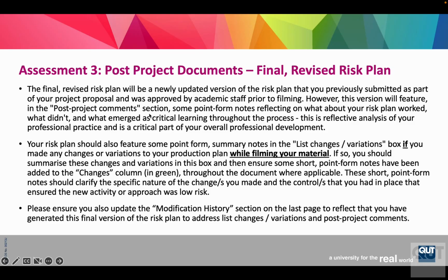Right, and again, knowing that a lot of time and effort went into developing this plan in pre-production, and things changed and stuff happened during the shoot, then it's a case of the group coming back prior to submission of all materials and having a very quick conversation that will generate some point form notes that go into the post-project comments section. And essentially what they are is what worked about our risk plan, what maybe didn't work so well, and what did we maybe learn about working with the risk plan, right? Just some very simple point form, common sense kind of things.